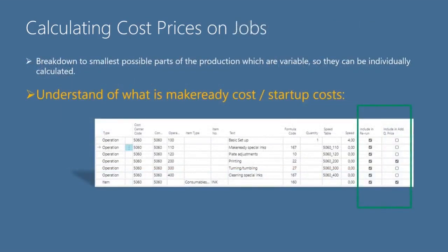It is quite important to evaluate each production step to see if this is a one-time make-ready cost or if it also applies to an additional quantity, which means that when the ordered quantity changes, this line will also change in cost value.